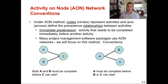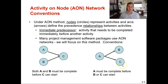On the right-hand side of the diagram, A must be completed before you can start both activities B and C, so A is an immediate predecessor to those two activities. Using the house example again: if B is doing electrical work and C is framing the house, then A would be pouring the foundation. You can't do anything without a foundation, so that must be done before you can start activities B and C.